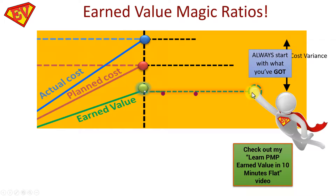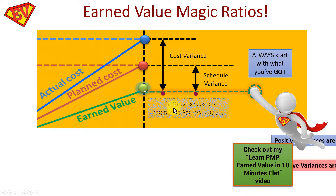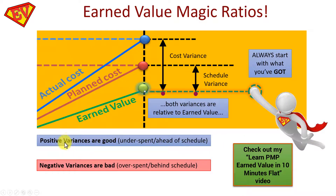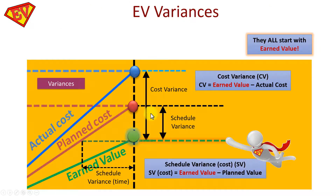The difference between Earned Value and Actual Cost gives you your Cost Variance, expressed in monetary terms (usually dollars). Similarly, Schedule Variance is the difference between Earned Value and Planned Cost. Positive variances are good — your project will underspend and come in ahead of schedule. Negative variances are bad — you'll overspend and deliver late. Draw this picture on scrap paper first thing in the exam, labeling Earned Value as your frame of reference, then noting Cost Variance and Schedule Variance.